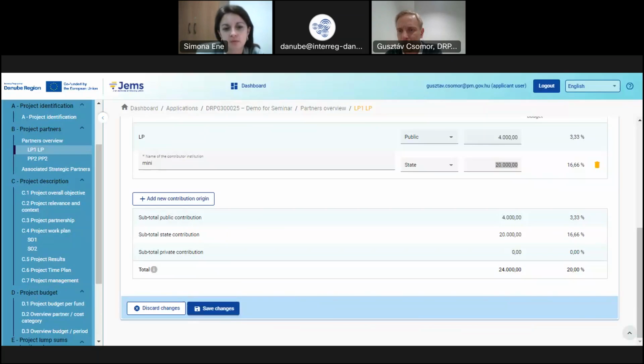Budget. Are there maximum amounts allocated either for individual cost categories or for the overall budget itself? No, it was said before, we do not have a maximum budget we give per project. The entire budget has to be justified by the activities. Yeah, but regarding cost categories, for example, since the program is not focusing on investments or equipment, obviously a partner budget dominated by that kind of costs are not welcome. So that will be negatively assessed.